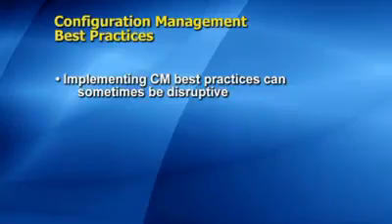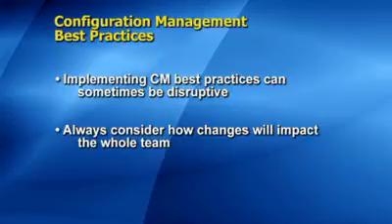Well, I find that implementing CM best practices can sometimes be a little disruptive because I'm really challenging groups on how they do things. Let me go to a particular example we haven't talked as much about, and that is change control. A lot of times organizations don't do a good enough job with change control. So they may be focused on the calendar: can this weekend have a new set of code pushed into production? But perhaps they didn't include all the right stakeholders and evaluate technical risk. So when I'm implementing these new practices, I've got to consider how these changes impact the whole team and what can really help them be more effective. Change control is one good example.